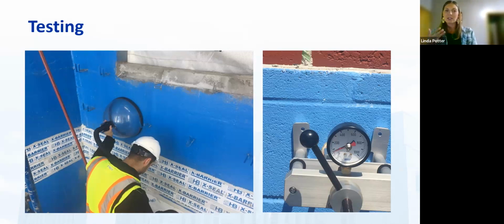There's just something leery about the people who are selling air barriers. You really don't want them testing things. You don't want them doing the inspections, because it's just too blurry of a line when you're selling something and then trying to decide if it's acceptable for an owner and for your projects. So we often like to see those be third party, and then ensure that the contractor understands they're responsible for paying for those third party tests and how many of them you want.